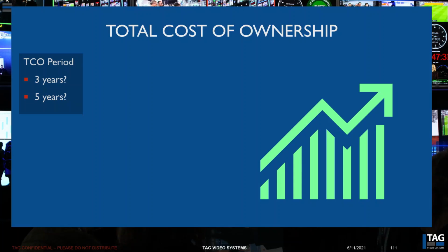So really what you're going to have to figure out is, what is this TCO period? You'll find that a lot of vendors use a 3-year amortization period for their subscription models versus their CapEx models. In that if you were to license and buy their software versus renting it as an OpEx model or with a subscription, at roughly 3 years you'd be break even. So maybe it's a longer period we really want to evaluate, like 5 years. So we really factor in those charges as well, and we make sure we're not paying too much for that software over a shorter period of time.